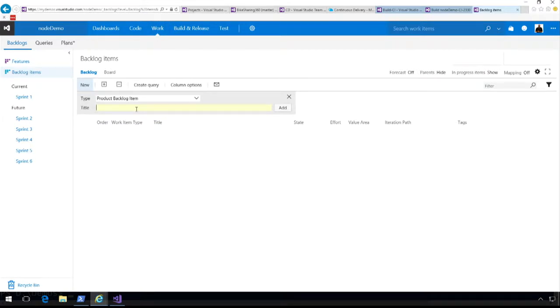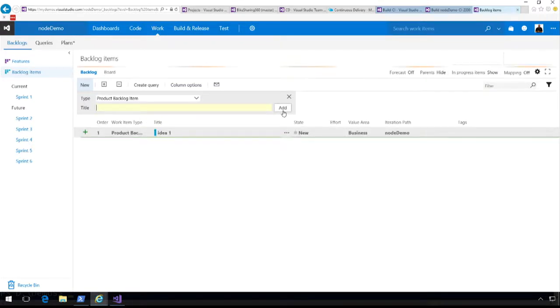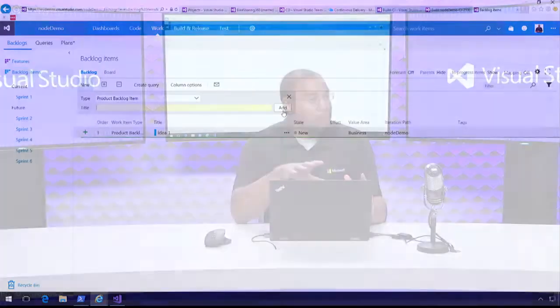And what I love about this screen is that as a Scrum Master, what I do very often during our retrospective or our sprint reviews, when we're doing our dog and pony show for our stakeholders, I'm in the back of the room and a stakeholder will yell out this great question, and then what I will do is say, that was a good idea. So I'll put in there idea number 1, and I'll simply click on add, and I'm able to quickly capture all this feedback as part of our review, and then afterwards I sit with our product owner and we prioritize this to make sure it's in priority order.